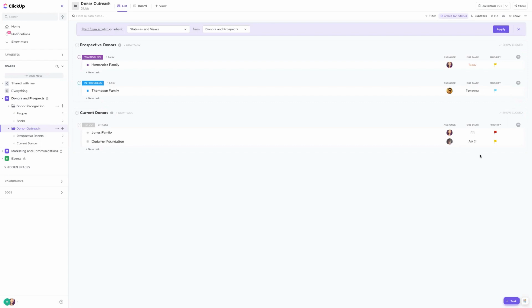A best practice in ClickUp if you're just getting started is to always have a due date on every task as well as an assignee, just so that no task will ever be forgotten. There will always be someone that's accountable for getting it done within a certain period of time. So as the assignee, Carvania here would get a notification on April 21st if the task was yet to be completed that it was going to be overdue, so she could attend to that.